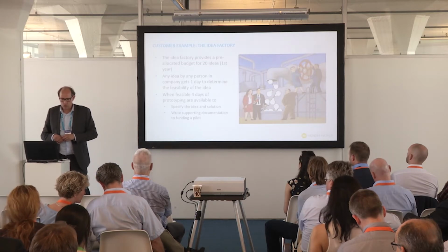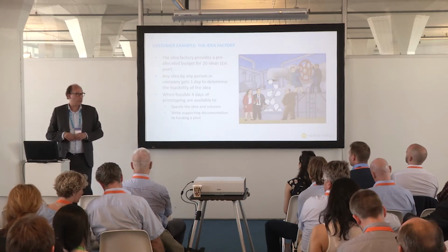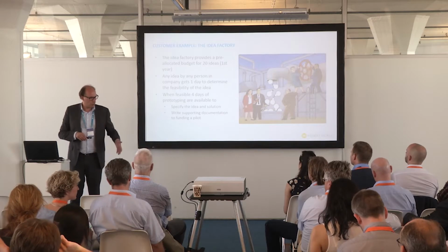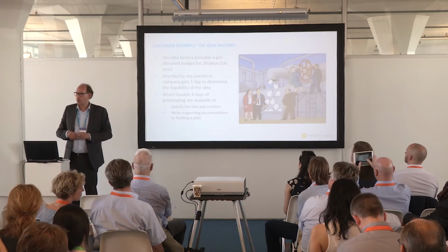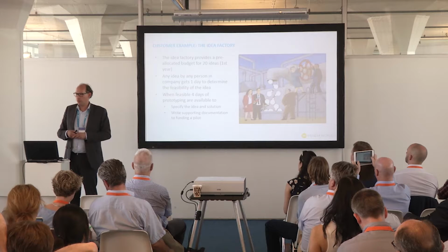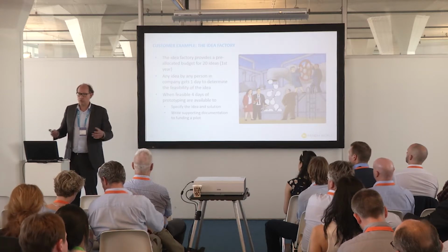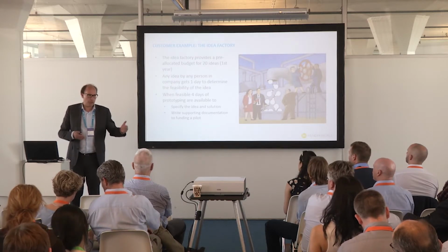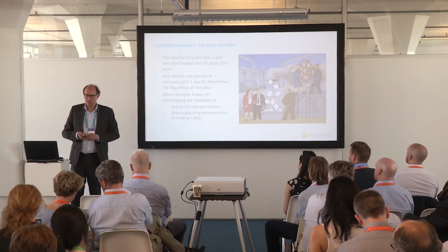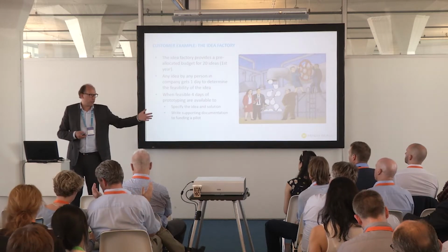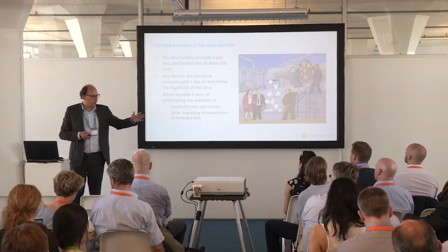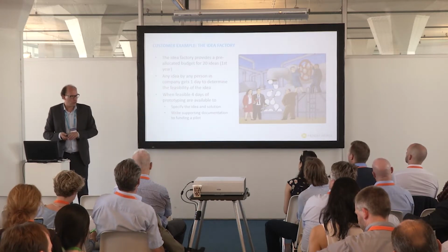In that phase, you will have another 4 days where you will have a business developer or a Mendix developer working together with you to create an actual small prototype. And based on that prototype, you need to convince the business for buy-in and get the next round of funding. I think LV is doing something similar, be it a bit different, but we were just talking about that, Rob.